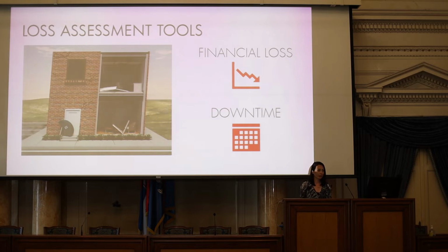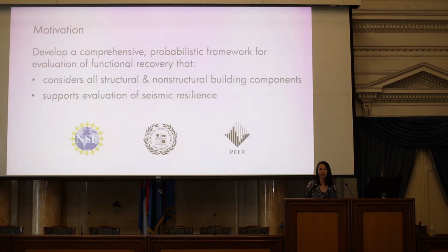However, when it comes to repair time, it's much more complicated than that because there's so much involved in the repair of the building, from inspectors coming on site and evaluating the damage, engineers, if needed, redesigning the building or providing a retrofit solution, then going through the permitting process and so forth. Once the repair starts, you have so many crews that you have to organize within the building, and it's complex. And that's something that my research group did.